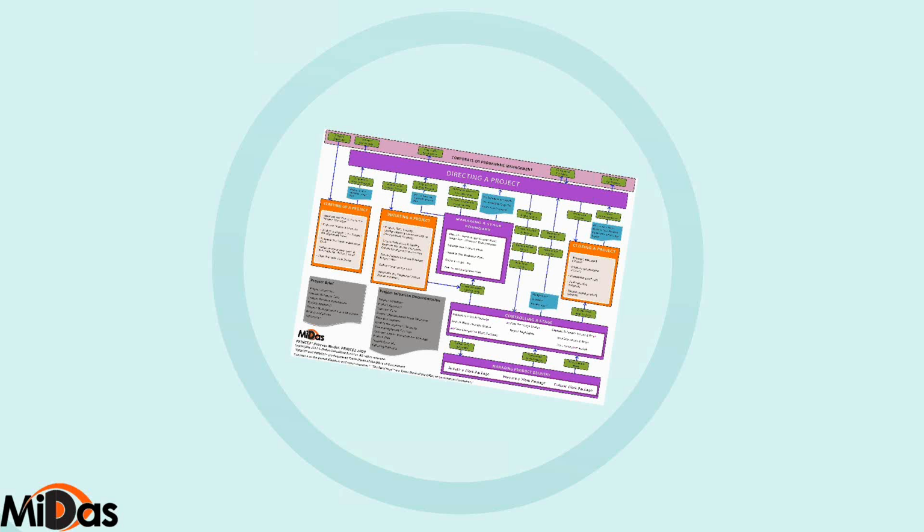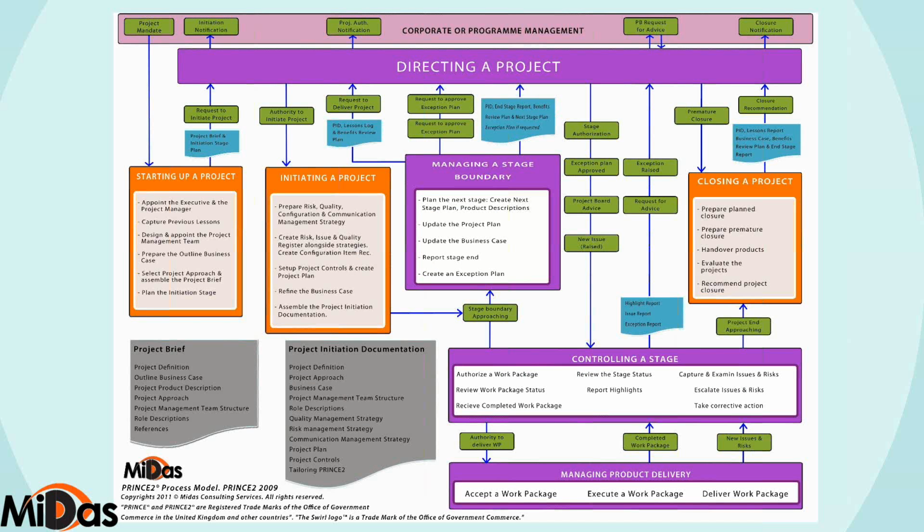He'll see what kind of project management team he requires. Does he require a team manager to take care of the delivery, or can he play the role of the team manager? He would decide whether we need a change authority, a project support, some kind of assurance, something like that. So he'll see what kind of project management team is required to manage this change, and he'll give a design to the executive. The executive will see and approve the particular design, and the project management team would be appointed.